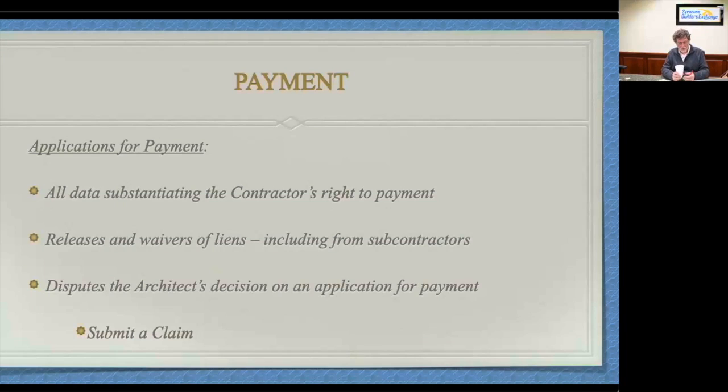They're going to include subcontractor release and waiver documents. They're going to include your own release and waiver documents. It might be certified payrolls. It could be record documentation. It could be anything. It'll be spelled out often in a spec. Okay. But the second bullet point here